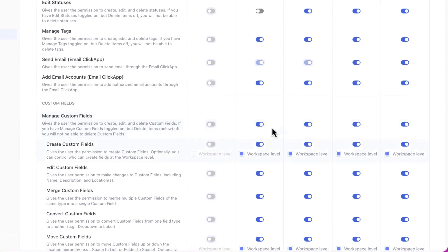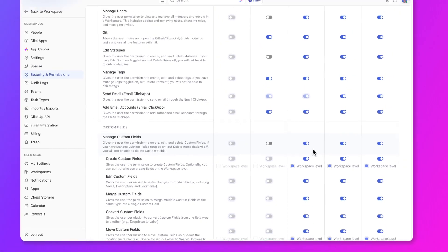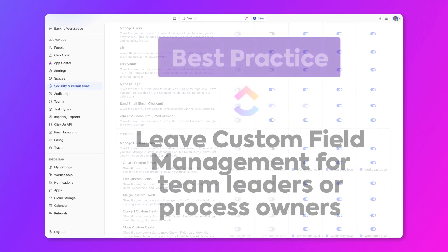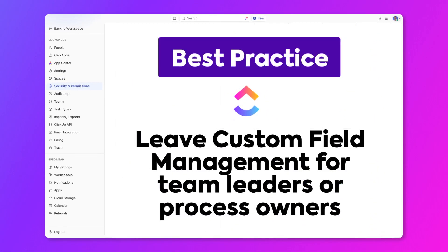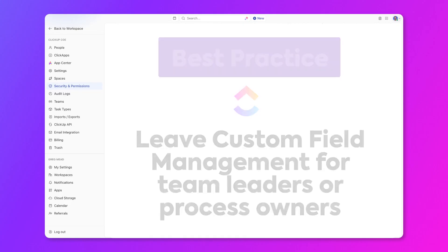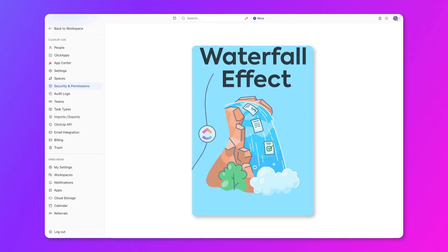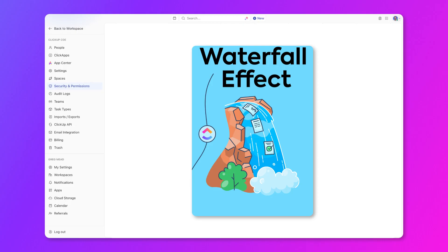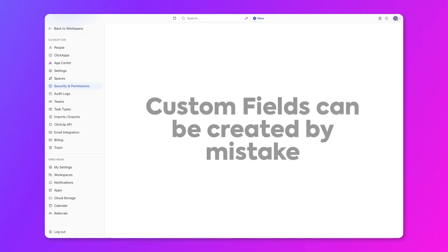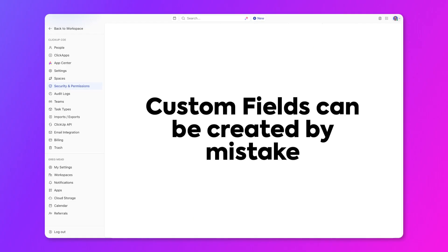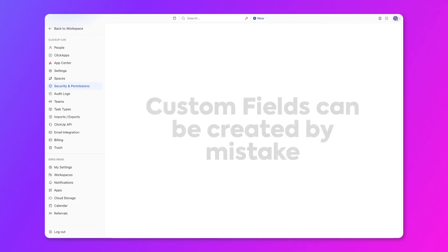Next, similar to statuses, leave the management of custom fields and access to Custom Field Manager to team leaders or process owners. Remember, custom fields trickle down with the waterfall effect that was mentioned in the first course. If you have a custom field at the space level, it'll be available in all locations within that space. So if you let everyone create custom fields, you open it up for members to create custom fields by mistake or even in the wrong locations.